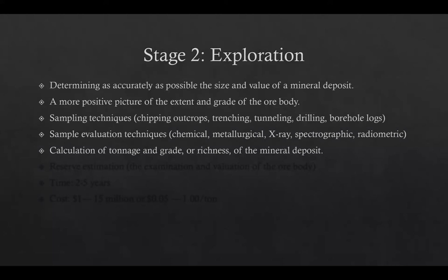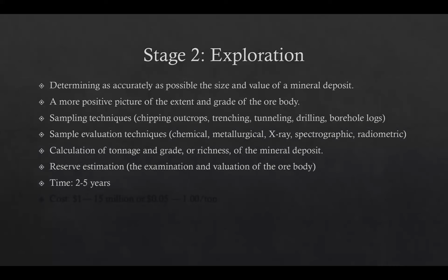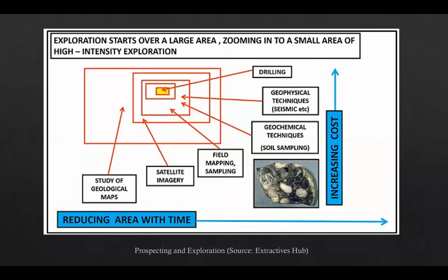At the end, the profitability of the mineral deposit is concluded by analyzing different costs involved in different stages of the mining project. This overall process of the examination and valuation of the ore body is known as reserve estimation. This stage usually lasts up to 2 to 5 years and it costs $1 to $15 million based on the extent of the deposit. This picture here shows an example of the scale and cost of the techniques involved in prospecting and exploration stages.